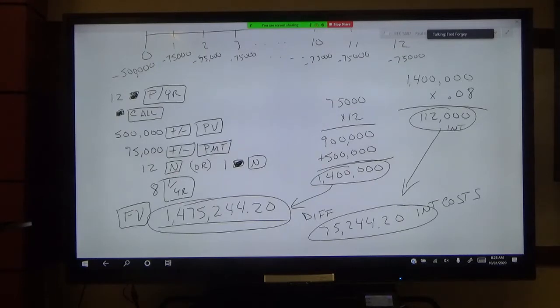If you have a developer that is known for, as soon as the job is done, they get paid, and it's all fair, very quick and painless, versus a developer that's known for, you submit an invoice and it's going to take 60 days, 90 days, whatever to get paid, and then there's going to be arguing and bickering over little details, then over time that developer's going to find it harder to get contractors to be loyal to them and, in many instances, to want to work with them, for lack of a better word.